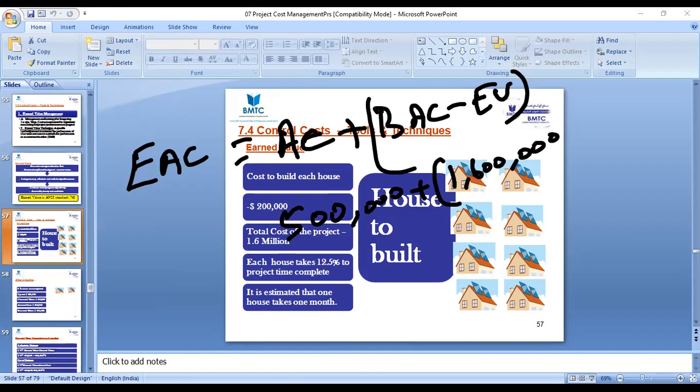What is your earned value at the end of the third month? 400,000, right? Yeah, completed. So you know very well that in earned value, you are not giving the credit. If 99.9% of the work is done on a component, you are not giving credit. It will give only 0 credit. If the work is started but not completed, you're still going to retain only 0 credit. If all the planned work is brought into a component, you'll be giving 100% credit for that